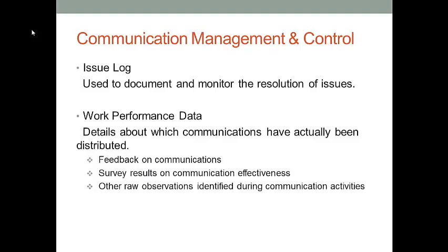Several techniques are available for you to measure your communication management performance. For instance, you can organize meetings with the stakeholders and listen to their feedback on the information update quality. You can also distribute surveys among stakeholders and ask for their comments and concerns in the communication process. These are the techniques for you to choose to measure your communication management performance.